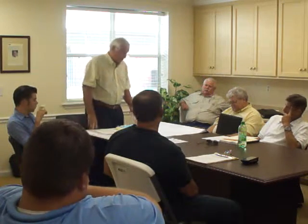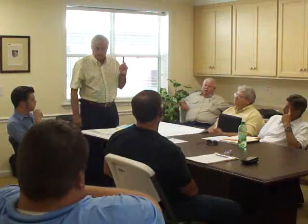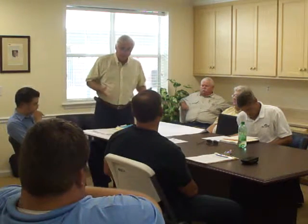Okay? What these documents do is they identify what the component is responsible for. The GC has to do everything else. And that will include some subcontractors that he hires directly. He has one contract that the GC does with the owner, the Valdosta Housing Authority. Then he has contracts with his subs. That's right. Components are over here in another category. And now a component can have a sub. We're not saying a component can't have a sub.